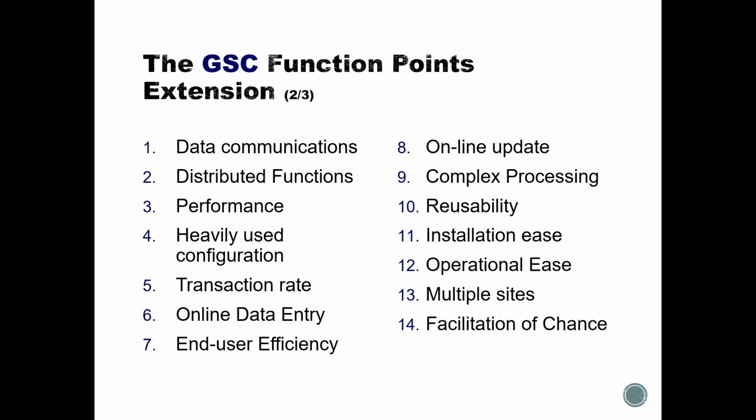For example, performance of the system, transaction rate, reusability, installation ease. They are sort of multipliers on how complex or how many functionalities things have. Does it need to call somewhere? Does it have to be able to update itself? Or is it something that's just doing its stuff until the sun explodes or something like that?